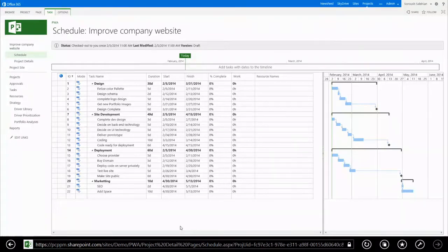If it does time out, you can also recover the projects. So if you leave your machine on after 15 minutes, it will close the scheduling engine in the back end, but it will keep your file there for about 2 days. So if you come back to it and hit refresh on your project, it will just find that file. It knows what engine had it open, opens the project, loads it again, and you can continue editing.